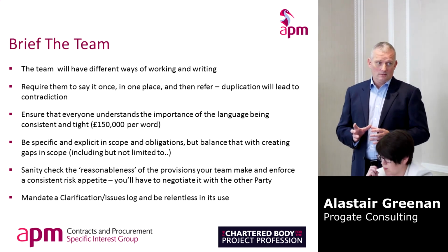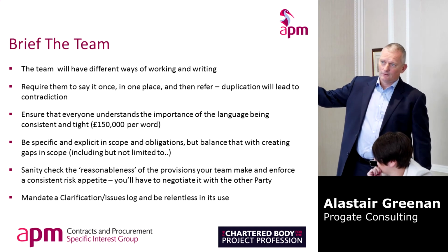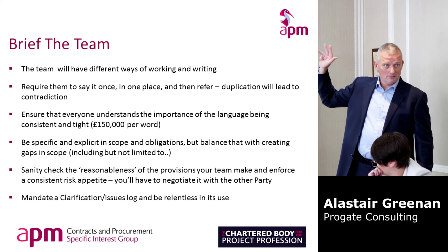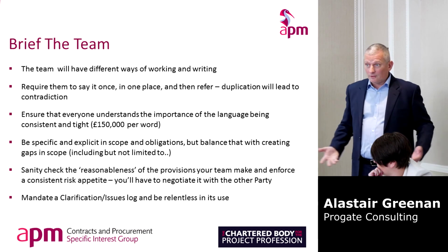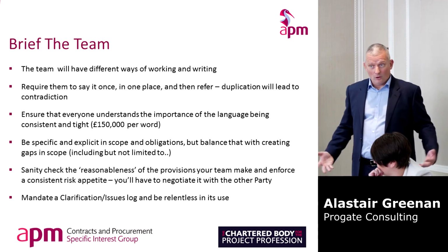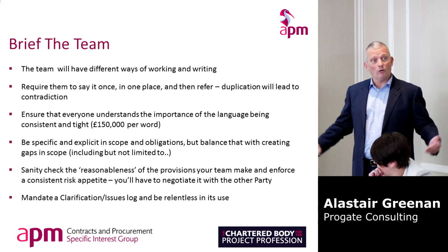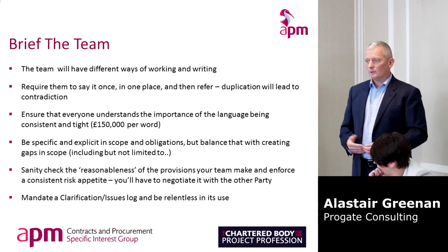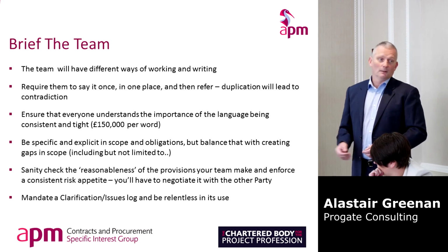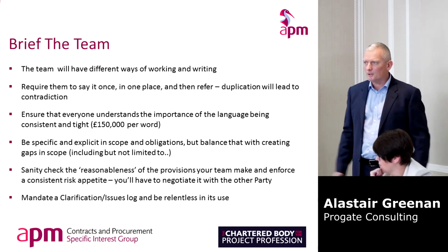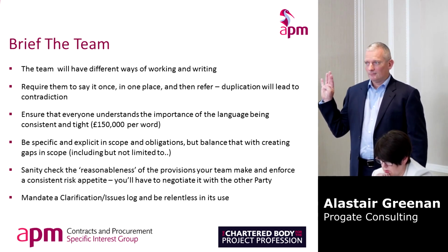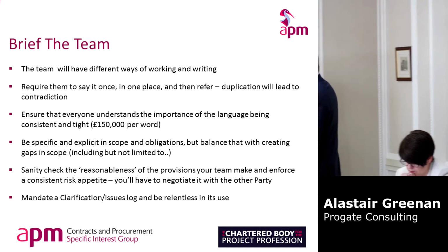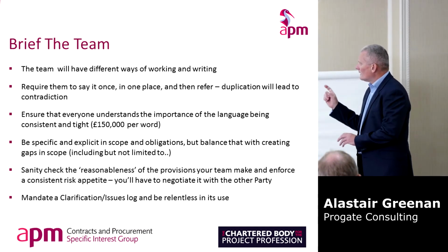£150,000 a word. In the vicinity of, £600,000 is what that cost. That was somebody saying, you remove all the dead services to the periphery of where you're building, in the vicinity of. Now they went, well, that's a meter. And the person who wrote it went, no, I meant the car park you're building on. Four words, £600,000. Do you mean meter?